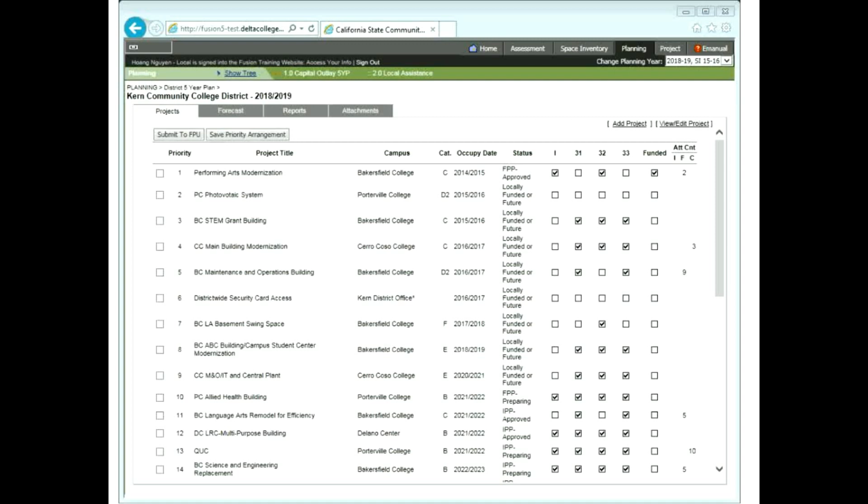You'll use this form instead of any other form. The JCAF 32, instead of entering the information there, it's pretty much the same level of information, except that it will be included in the Q&UC, which will pre-populate the JCAF 32. The JCAF 32 is recommended, but not a requirement. At the IPP stage, it's what is used to calculate any contribution points. Just to add to Carla's comment, the display may be different in that you're actually opening up the Q&UC for the IPP, but the level of detail that you're going to have to provide is essentially the same, because we're keeping it high level, so it's consistent with the JCAF 32 summarized level.